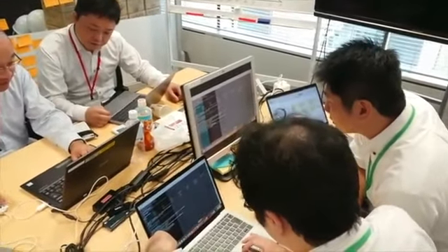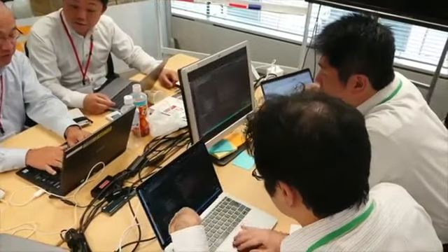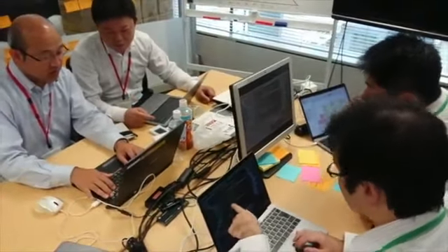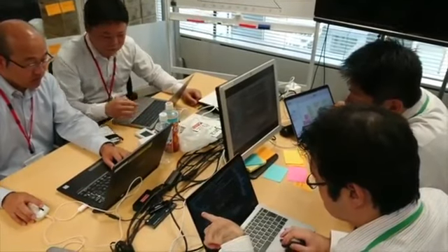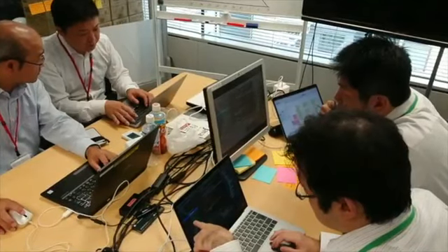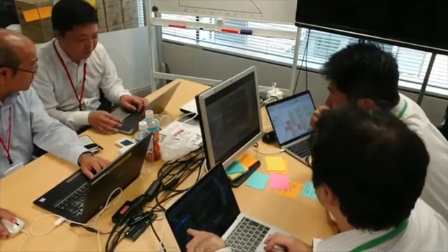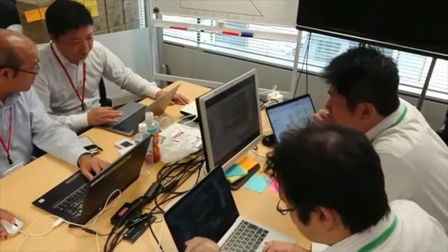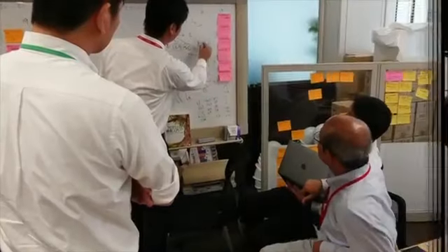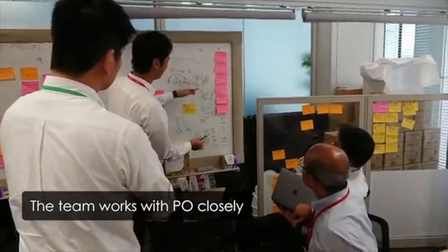I show you great performance of our development team as a reference for how they worked. Our development team worked 2 weeks a sprint with 4 engineers a team, and they created a body process of the services in 2 sprints, and some of the developed Java source code is about 11,000 lines of code in 4 weeks. Amazing speed. They used pair programming, test-driven development, and refactoring in XP practices, and also continuous integration every day. Therefore, I would say to implement TPS-style Agile in this produce process.